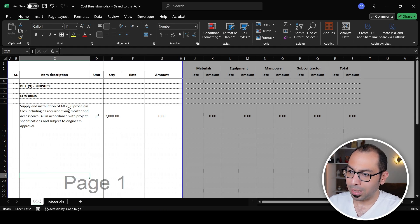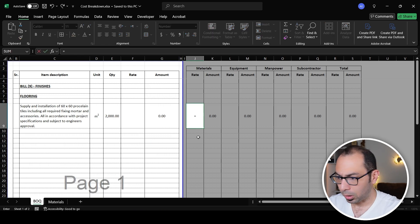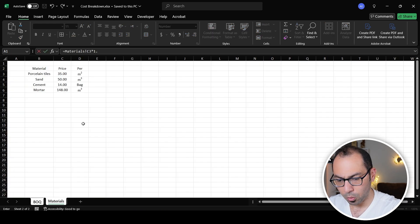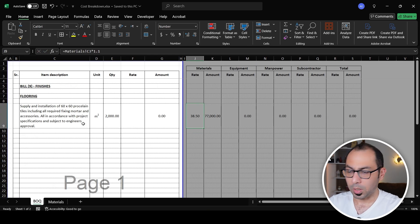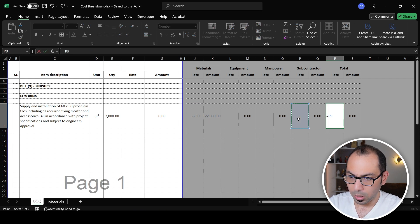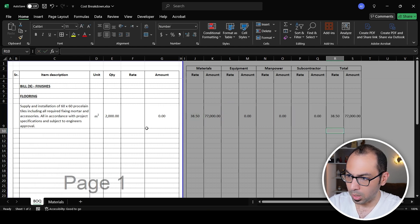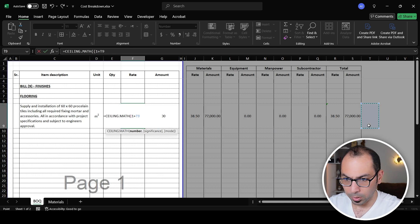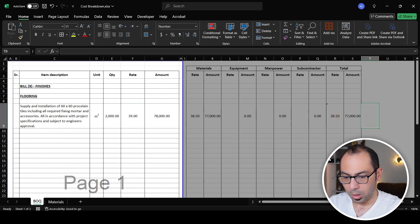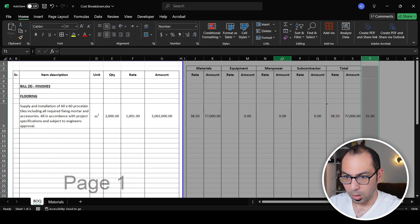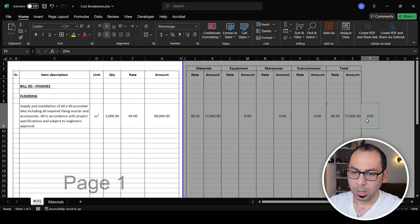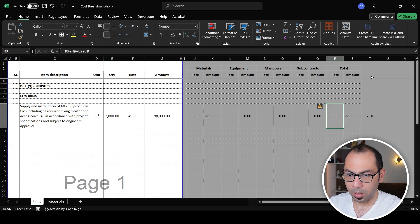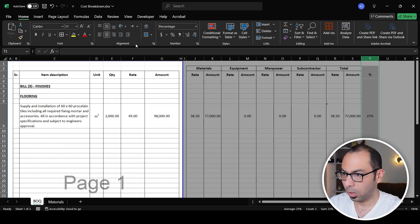Now I'll estimate the materials. For supplying the porcelain tiles the rate equals 35 multiplied by 1.1 to allow for 10% wastage, giving 38.5. The total rate in the BOQ will equal ceiling price, which is 1 plus the markup — say 25% — multiplied by the cost rate. So the ceiling price is 1.25 times the cost rate.